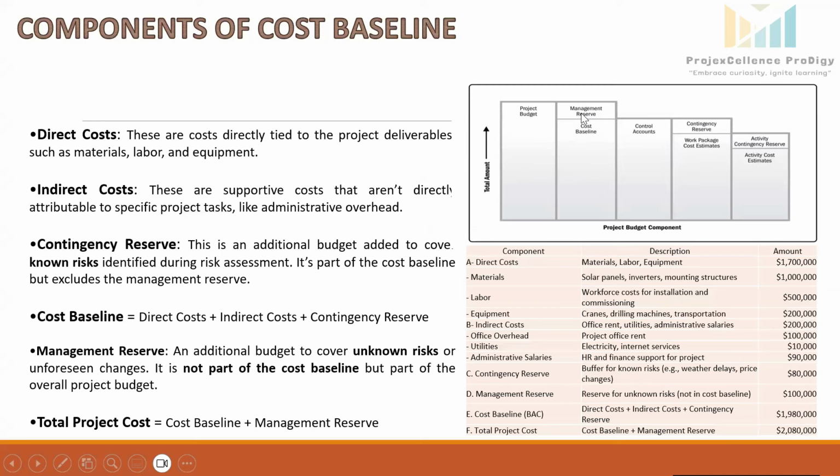Management reserve. This is another crucial component of project budget. A separate portion of the budget is set aside by management to address any unforeseen risk or changes in the project scope. This is out of project manager jurisdiction. This reserve is only accessible with management approval and is not part of the cost baseline.